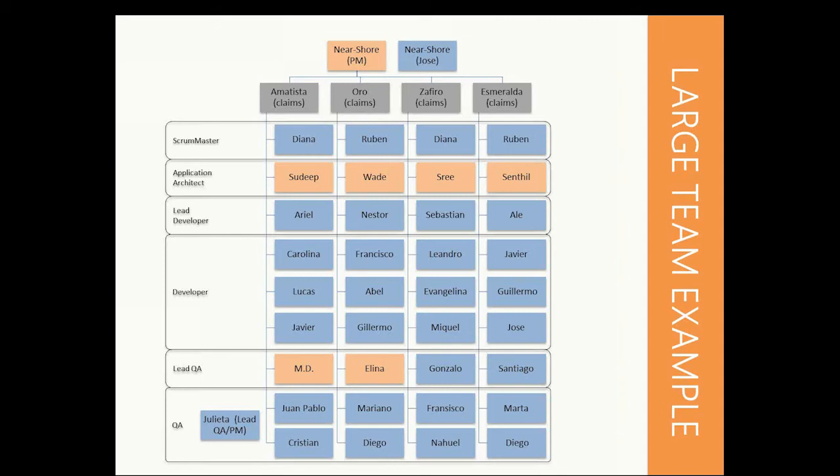In the smallest possible setting, this group would have a Scrum of Scrums with the 2 Scrum Masters and probably the 2 project leads for the nearshore group, and that's it. I think in reality, for most of the Scrum of Scrums that we were conducting in this project, it would be more typically a group of about 10 to 12 people, because others would come along. That's my view on selecting people for the Scrum of Scrums.